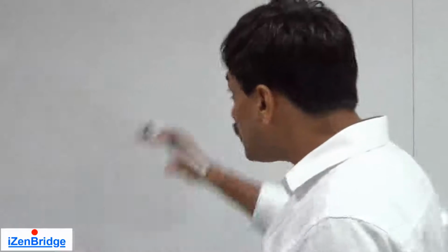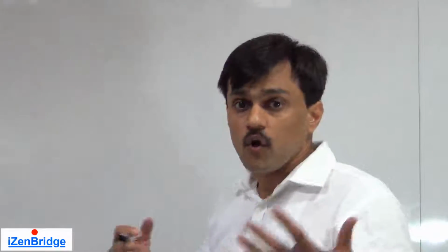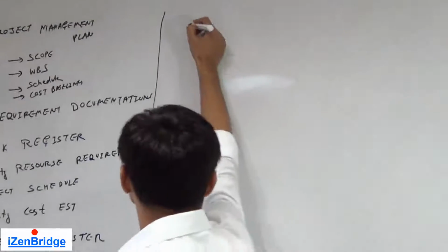While you are doing this make or buy analysis, do remember you need to consider all possible costs: costs related to support, costs related to future enhancements, lifetime cost. As many details as are given, you need to consider them all. So the first analysis is make or buy analysis.